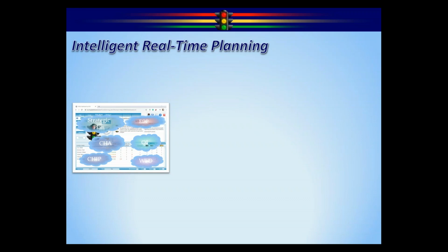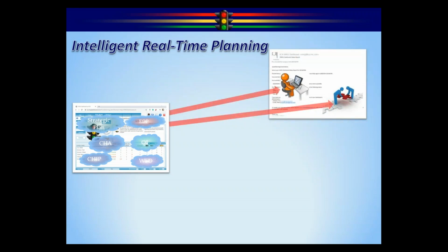objective lead and an activity lead, and it asks 3 questions. Has this person been in the last 30 days and updated their stuff? Does this person have anything that has fallen behind schedule? Does this person have anything that's overdue? If none of those are true, no email goes out. If any of those are true, out go the emails. As I had mentioned, emails can go to internal folks as well as external partners.